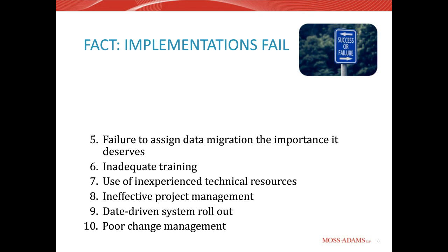The best practice, in my experience, is to avoid loading years of historical data wherever possible. The further back you go, the more likely you're going to run into data migration issues. So instead of transferring years of historical data from your legacy system to the new system, you can simply keep an archive copy of your legacy data and refer to it when necessary.